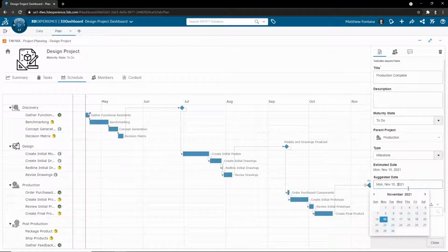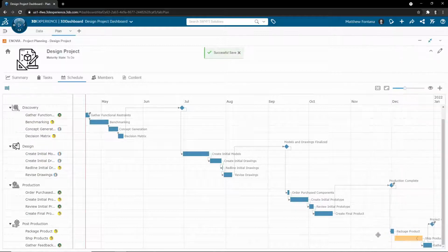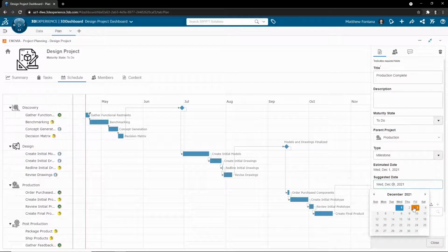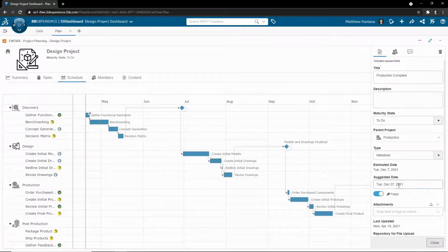If you have a tolerance assigned to the duration of a task and you adjust alternate tasks, resulting in compression of the task with the tolerance, there are visual cues to help signify the level of compression. The compressed tasks will turn yellow with one arrow if slightly compressed, yellow with two arrows if heavily compressed, and if the compression exceeds the tolerance, the arrow signifying the dependence will turn red.